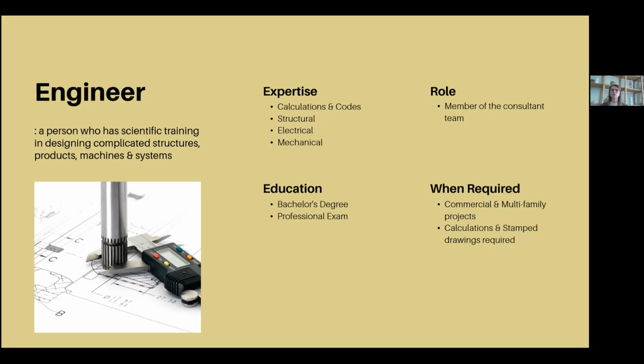And so when you are looking at a residential project, generally you will need a structural engineer on a new build or renovation where you're looking at changing any of the load-bearing capacities. Electrical and mechanical engineers are more so for commercial projects. Could be used residentially, but not as often.